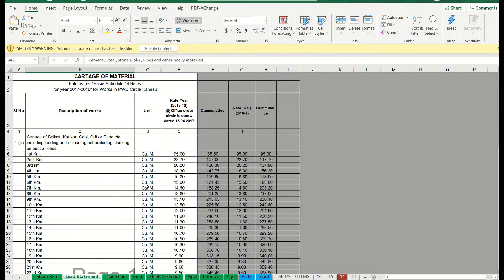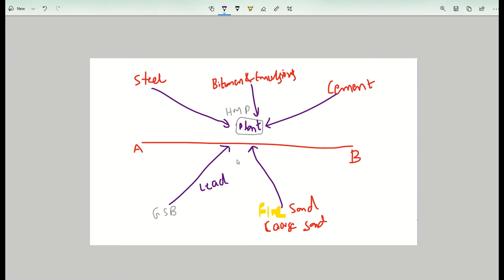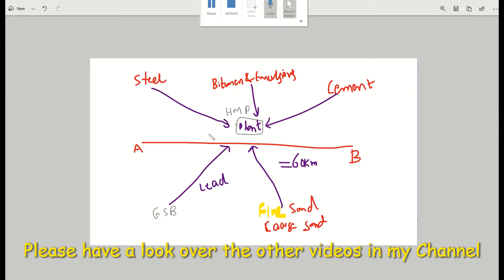I will show how the lead chart looks. Suppose your alignment starting point is A and ending point is B — a road project of around 60 kilometers. Normally the hot mix plant shall be kept at the midpoint of these two. Once the hot mix plant location has been finalized, we have to calculate the lead. Lead is nothing but the distance from the material source to the plant. That distance is the lead, which is then multiplied by the rate given in the Schedule of Rates.